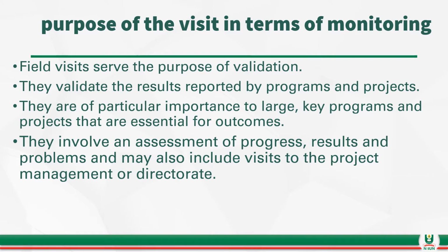In every program or project, you give a report depending on how long the program is. So during the field visit, they need to validate the results that have been provided for the program. Let's look at an example of immunization. Let's say oral polio. It has been reported that in this community 100 children have been vaccinated. So they decide to go to the site of the community where this program is going on.